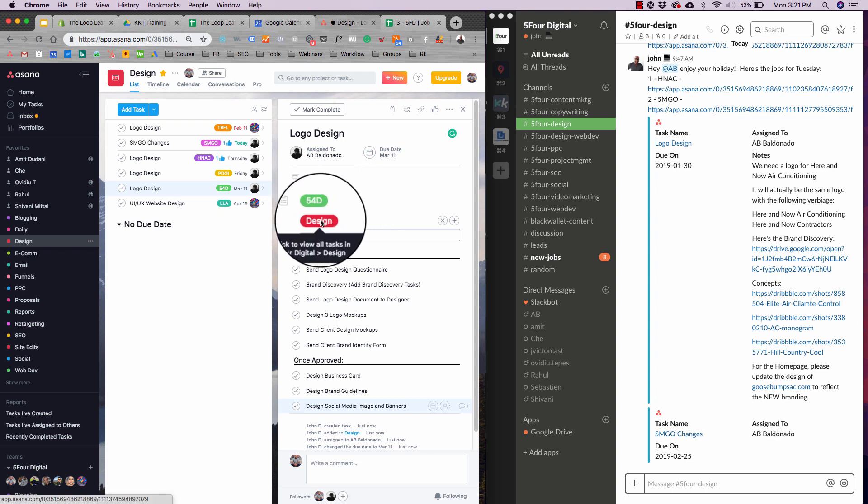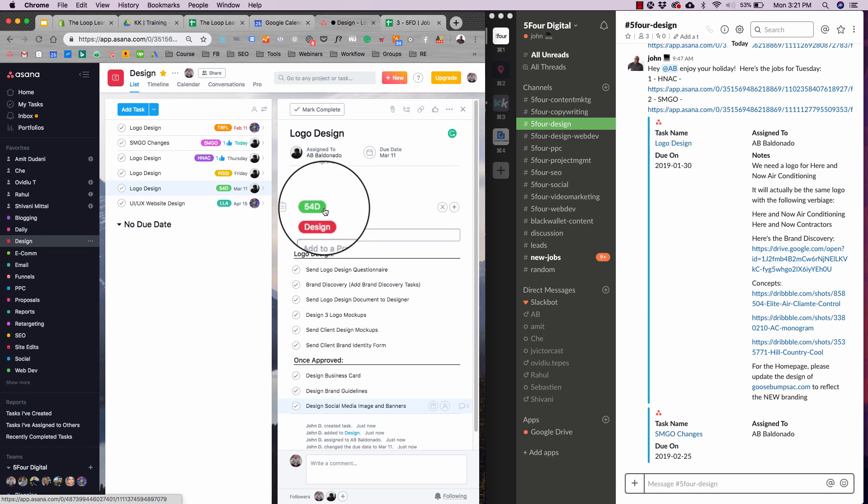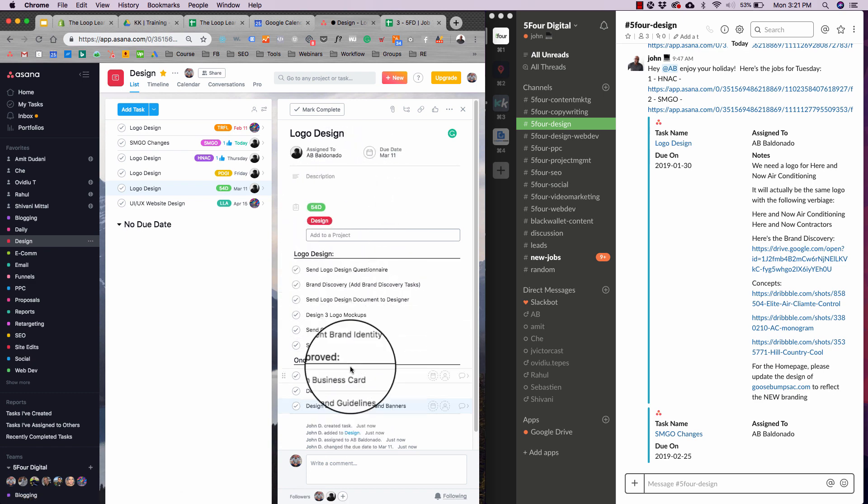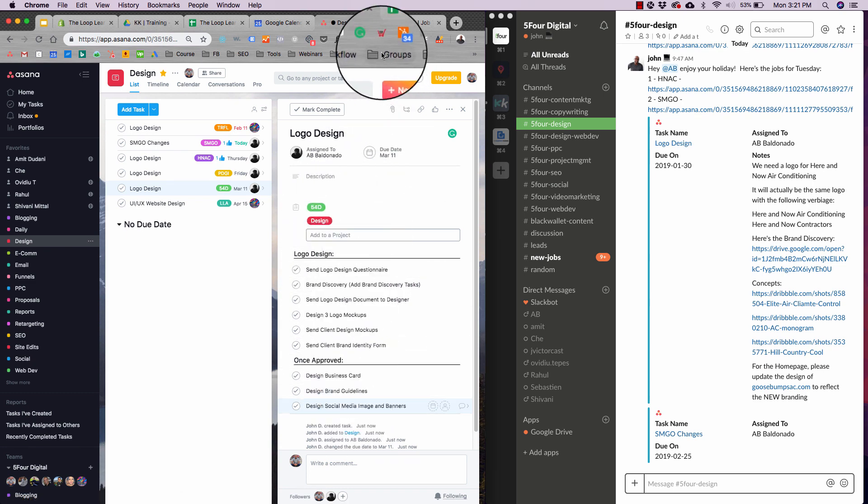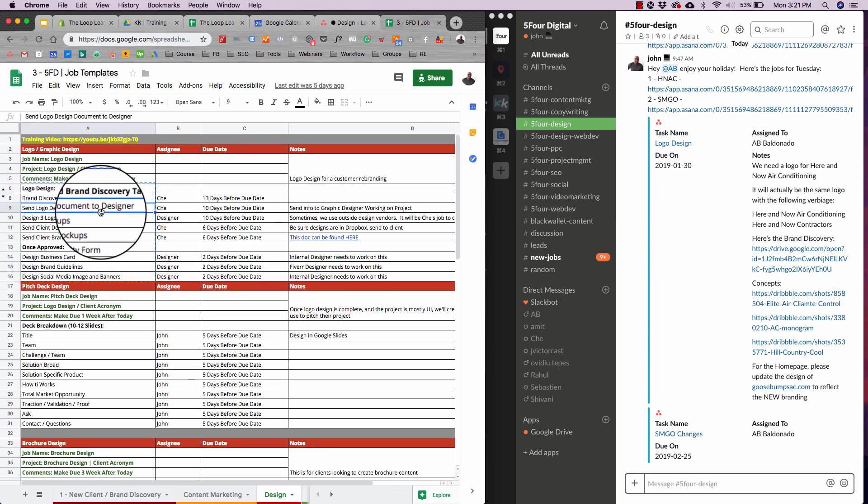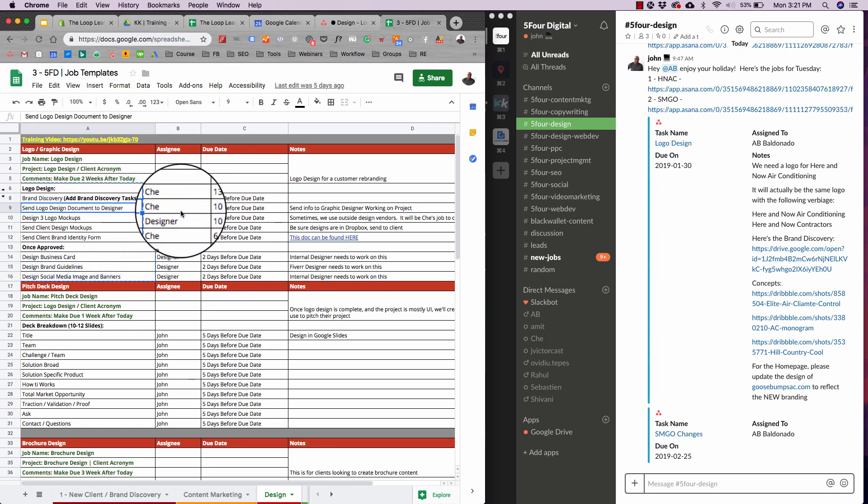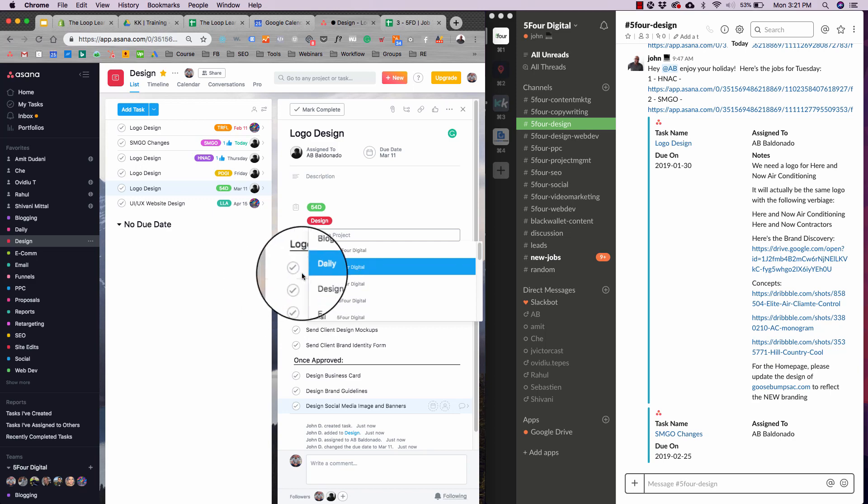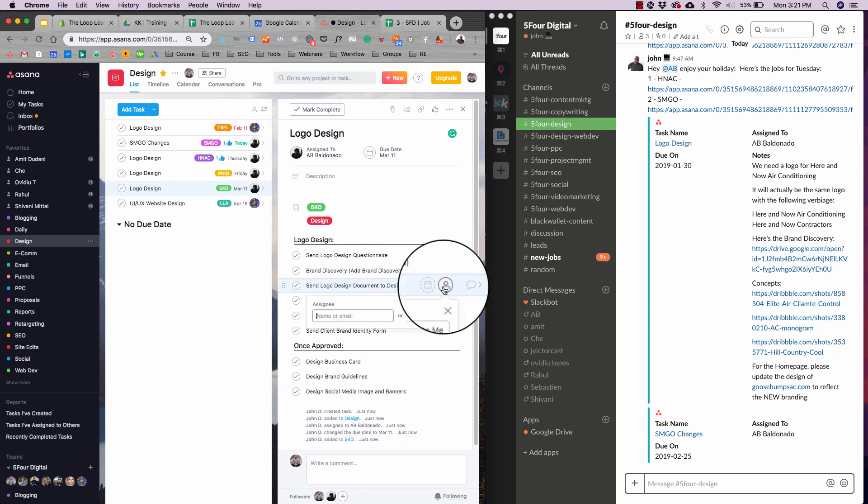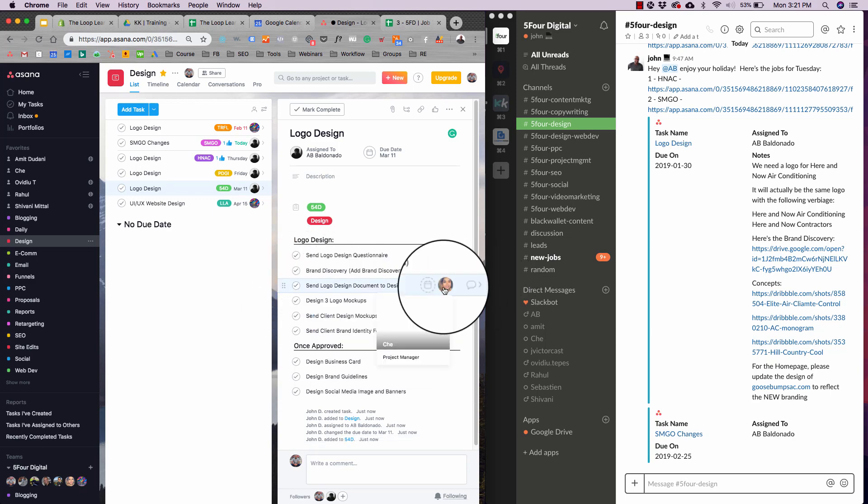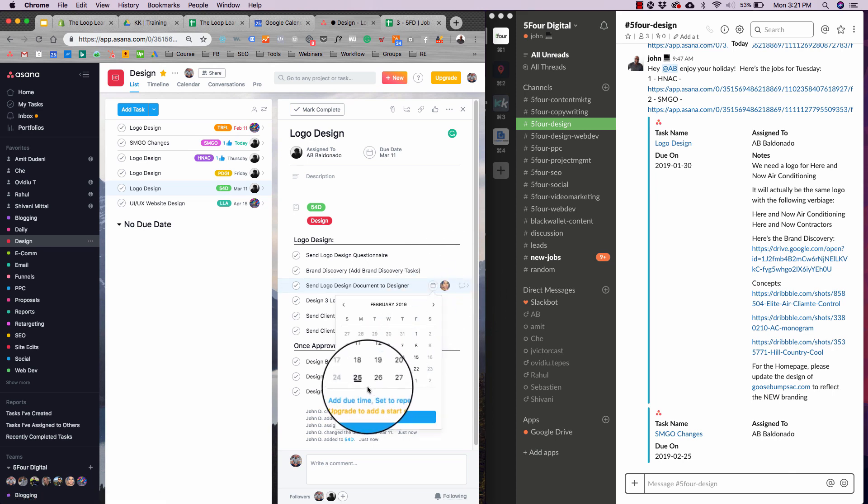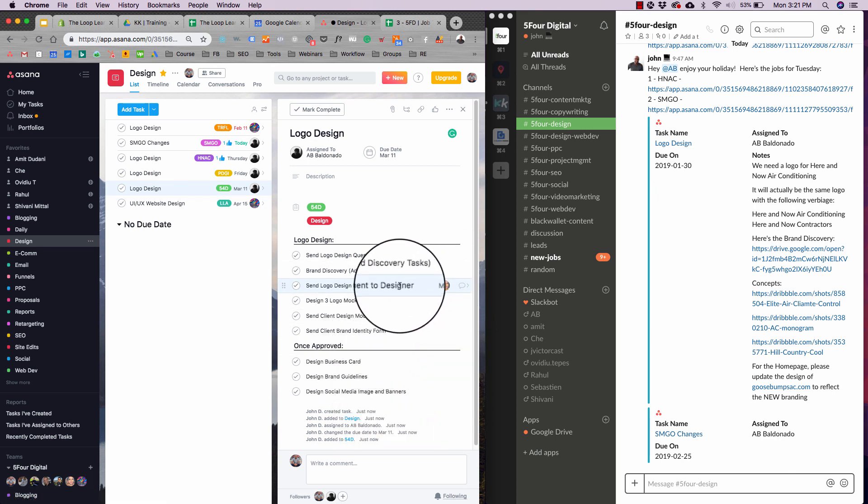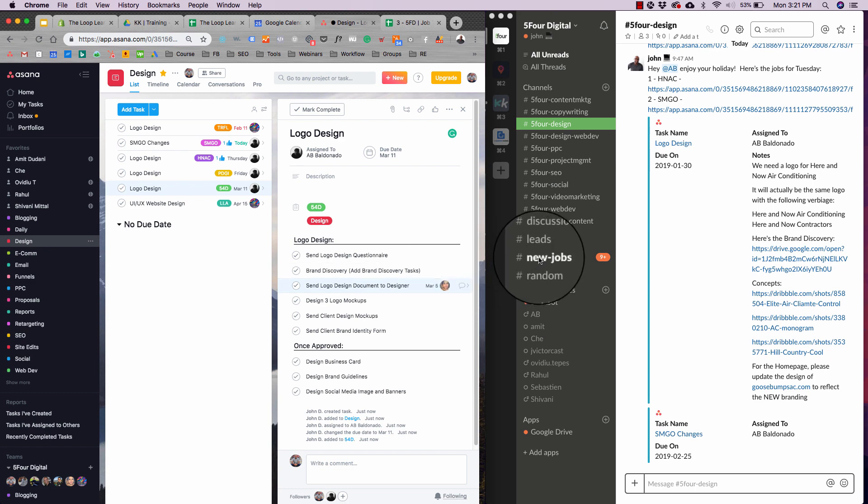So I always do two project types. I do the type of project, which can be design, web development, whatever it is. And then the second one is the client acronym. That way, every team member knows what they're dealing with. Now, the great thing about these subtasks is you can assign these to individual people. So if I go here, send logo design document to designer. That's for Shay 10 days before due date. I can go here, I can hit this, I can do Shay, and then I can say 10 days before. So let's just say that is the fifth. Now that's done. So now she's specifically assigned that task. She's going to get a notification via email that that's come in, and then everyone gets notified via Slack.